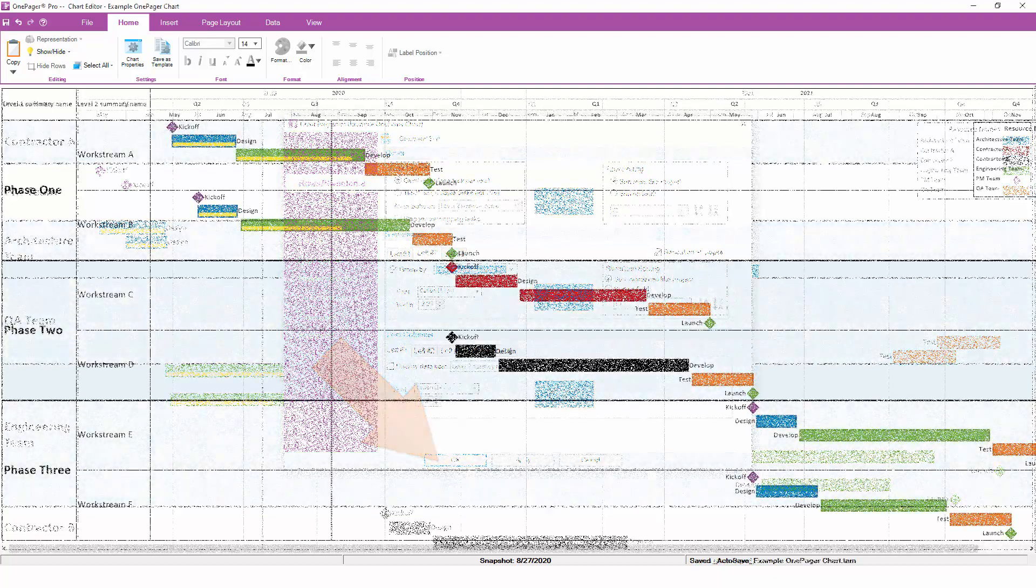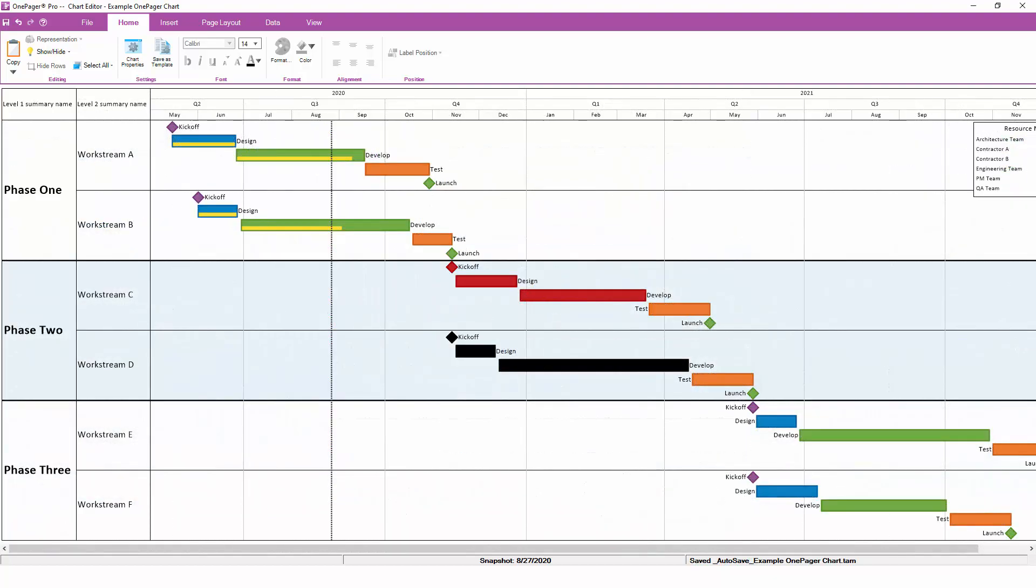If you were building a multi-project report across an entire portfolio, you could group first by the project name and then by the Level 1 or Level 2 summary names to create that hierarchy. Once we add that second level of swim lanes, we see the first grouping on the far left and the second grouping right inside it.